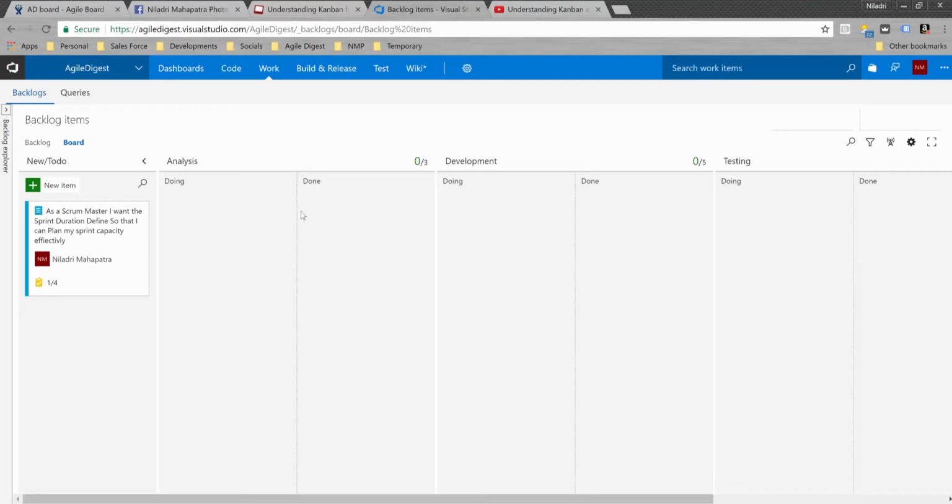That's one of the important principles of Kanban: if you limit all the work in progress stories, that will help reduce waste in development and make the developer, tester and the entire team focus on the flow of the stories. You can understand how that enforces the flow if you watch the other video on understanding Kanban flow.